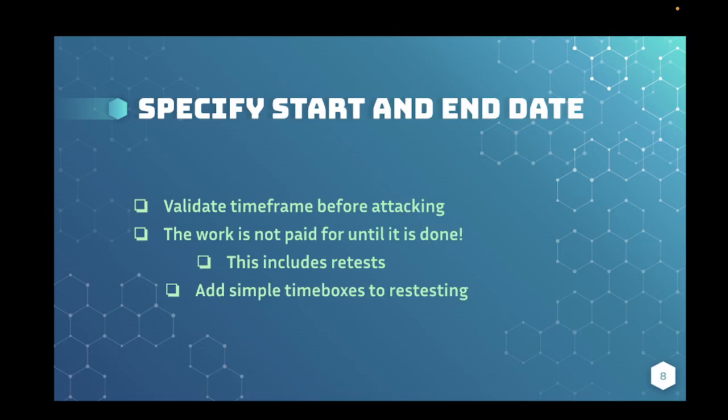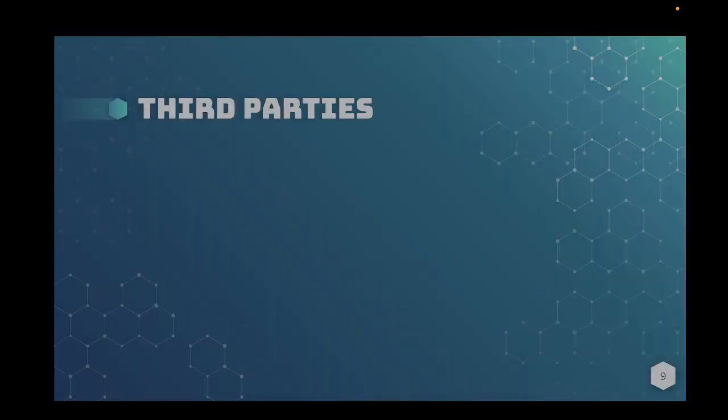The work is not paid for until it's done. That's something that you have to keep in mind. So this includes retests as well. Of course, you can offer retests because it shows that you care about your customer, but make sure that you add a simple time box to that as well, so that you don't go outside of your allotted budget either.